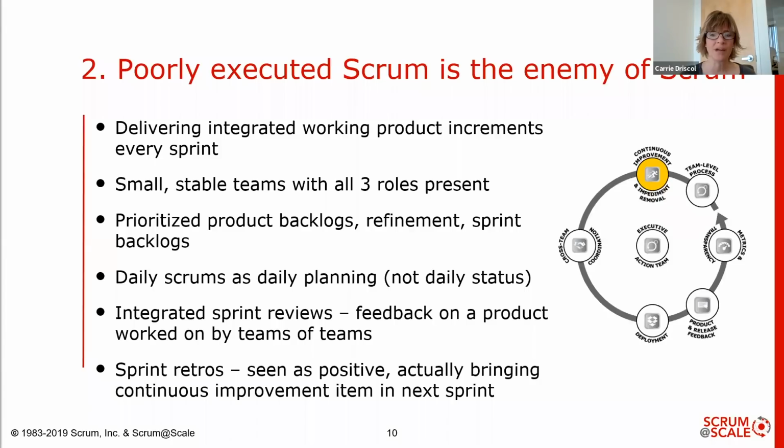So a 75-year-old manufacturing company decided to start an agile transformation and went with our suggestion of starting with a Scrum pilot. We worked together, set this team up with all the right roles, training, and Scrum DNA. They were a small, co-located, cross-functional, dedicated team focused on one prioritized backlog that was owned and reprioritized often by the product owner, who was from the business. This team did really, really well as they had the complete backing of the organization to do things outside the box in order to prove that Scrum works here and its benefits are indeed realized here at company XYZ.